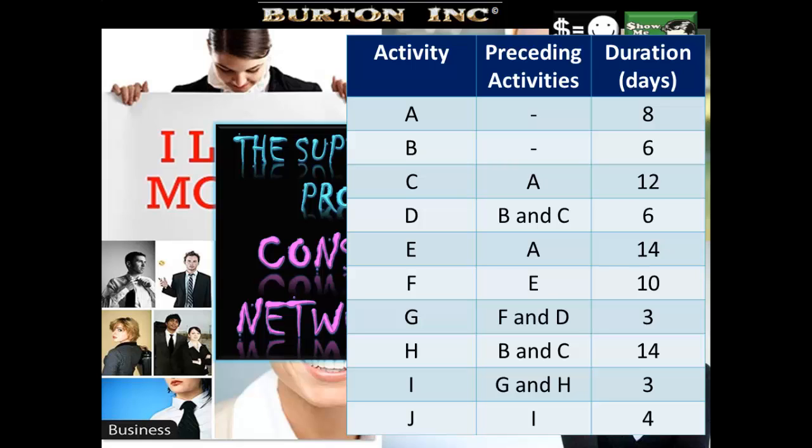E precedes A. F precedes E. G can't get underway until F and D are completed. H can't get underway until B and C are completed. I can't get underway until G and H are completed, and J needs to be preceded by I. So you can see that this one is quite a lot more complicated than the previous example. How do we go about laying that out?